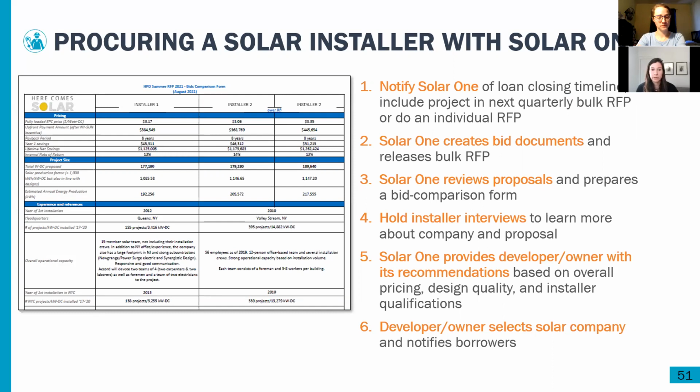Basically, we would create bid documents, run the RFP, and then prepare a really detailed bid comparison form to provide to the project team so that they can make a determination as to which solar installer they want to move forward with.